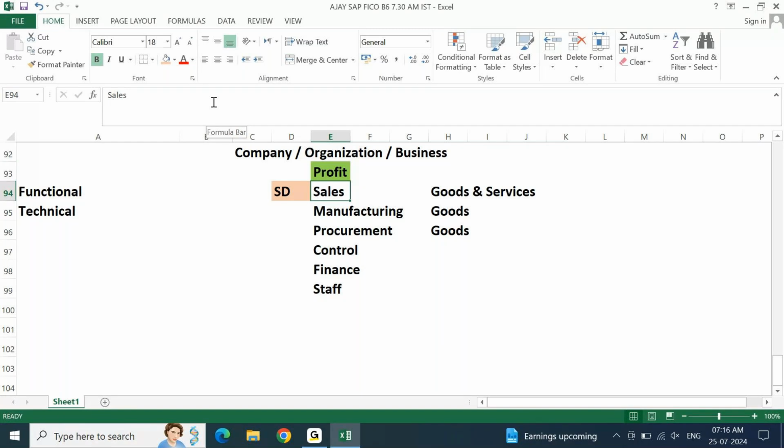If there is no documentation, if there is no written confirmation, tomorrow anybody can change. No, no, no, this is not what I told. Then I'll open the document, whatever we've discussed. Please find the attached document that we have already discussed and you have already confirmed. If it is not there in the document and now they are changing their word, they have to give that as an additional requirement. Agree? Because it was not given at the beginning. Now they are bringing that point. Then this becomes an additional requirement.